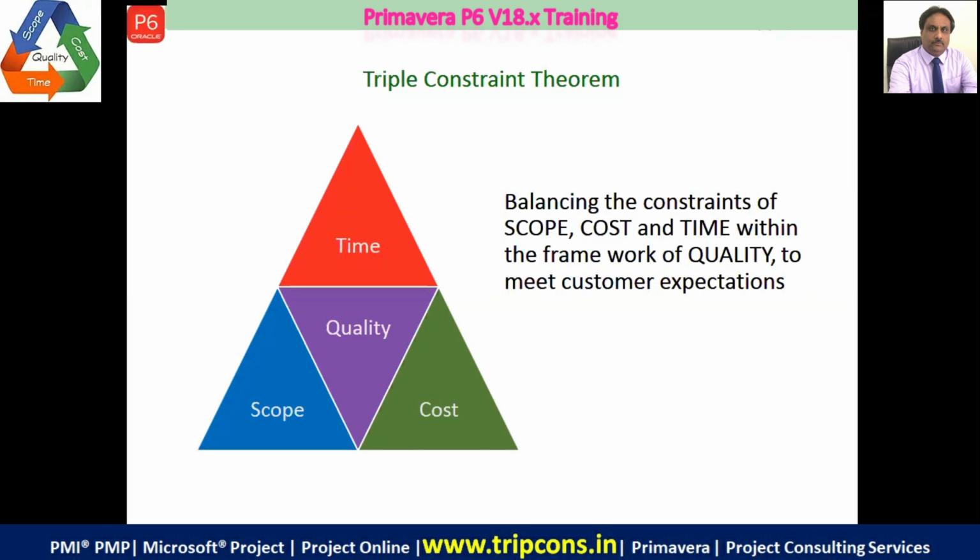Now tell me, guys, will the cost increase in this case if the requirement is increased? Yes, definitely, because if the requirement is increased, the scope is increased. If the scope is increased, then the time will increase and the cost will also increase. Now see one thing, if you look at the quality, the quality is helped by time, scope, and cost. If the work is not completed, can we achieve the quality?